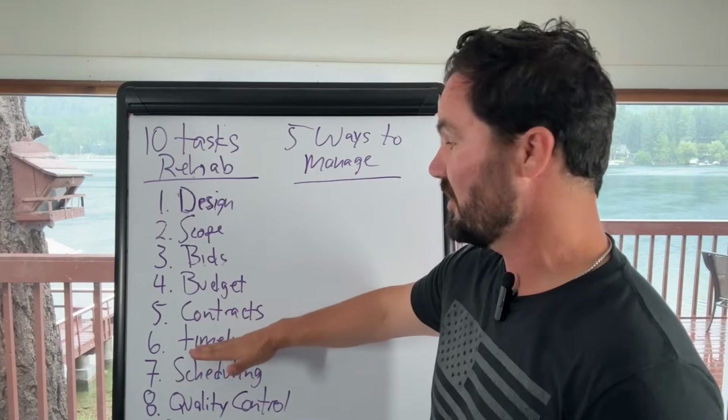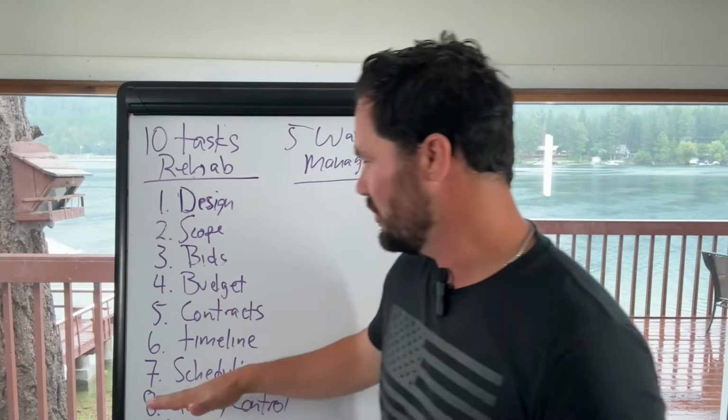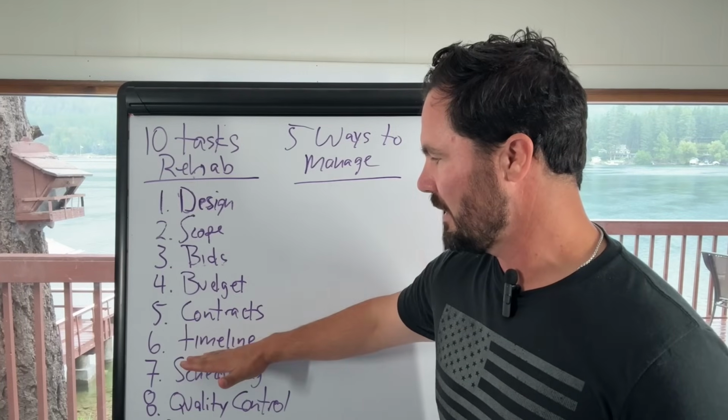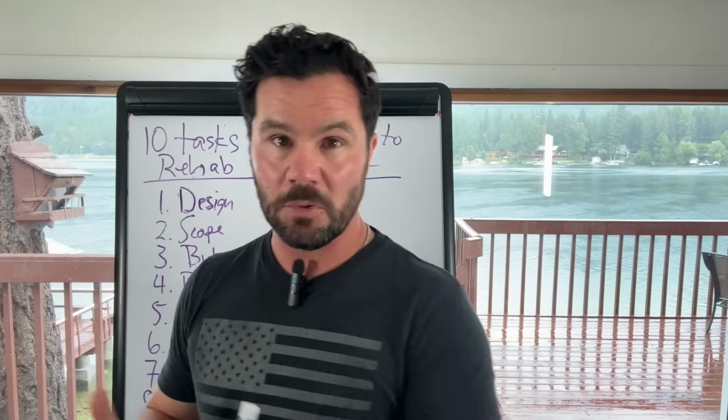Time is money. Every day I'm in this project longer, it's costing me money. And so I need to be able to create a very detailed timeline, and I need to help my contractors understand that timeline. Okay, so that's where number 7 comes in, scheduling. Once I've got my timeline narrowed down, I need to schedule all of the contractors I hired and make sure that they know when they're supposed to come in.